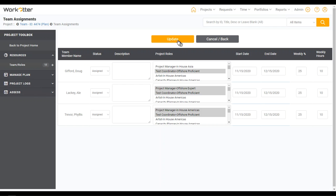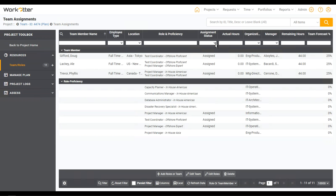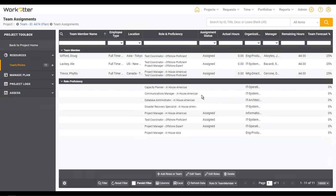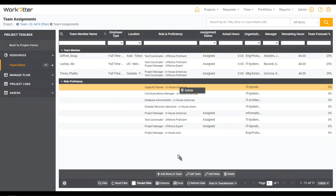I'm done — I've made my changes, made my selection, and updated those. I can also edit the roles, though there's a little less information here — it's really just about forecasting at this point. If you've got a role on here that's not assigned to a person and you wish to remove it, you can right-click and delete it, or click and delete it from the footer. Once an individual person has been assigned and is entering time, you can only inactivate them by closing their team assignment — you can no longer just delete them because we don't want to lose the hours and things they've done in the system. So that's a pretty comprehensive view on building a team within a project in WorkOtter.